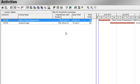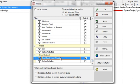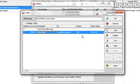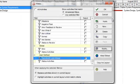Now suppose we want to change this filter to look at activities that start within the next two months. Click on the filter button, select One Month Look Ahead, and click on Modify. Change the filter name to Two Month Look Ahead. Change the high value to DD plus 2M for two months within the data date. Then click OK.